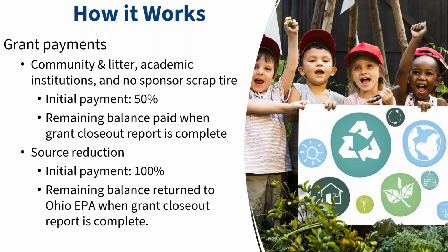Once awarded, no additional grant funding will be bestowed. You must operate from the current and approved budget submitted on the original application. If any changes do occur, please reach out to us before making these changes so we can pre-approve any budget modifications. Failure to do so can result in an ineligible activity. Remember, all budget modifications require EPA approval.